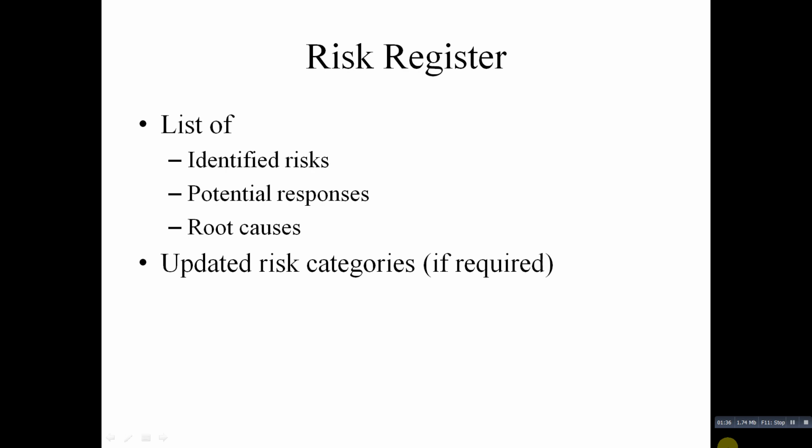First thing you need is an identification number for each risk event. The project team may want to sort by risk events or quickly search for a specific risk event, so they need to identify each risk by giving an identification number for each risk event. Then you need a rank for each risk event. The rank is usually a number with 1 representing the highest risk.